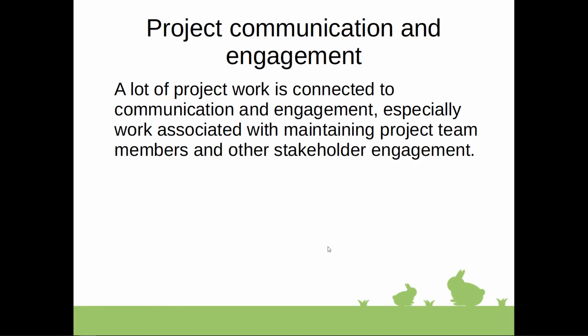And also a high volume of ad hoc requests for information can indicate that the communication plan is insufficient and might need review to improve regularly shared information towards the stakeholders. So it's a good idea to think beforehand to reduce these ad hoc requests and satisfy the desire for information from project stakeholders.